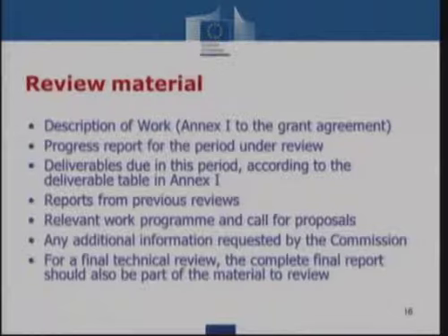On the other hand, the modifications can also come from your side. So if you want to modify things because in some areas the state of the art has changed, or there are other solutions or technologies available, and you would like to change it, I think the review meeting is also an opportunity for you to ask for permission to change the description of work. So it is on both sides that you can make requests for changing the description of work. And of course, that's then the basis to have the next review meeting on the new version of the description of work.